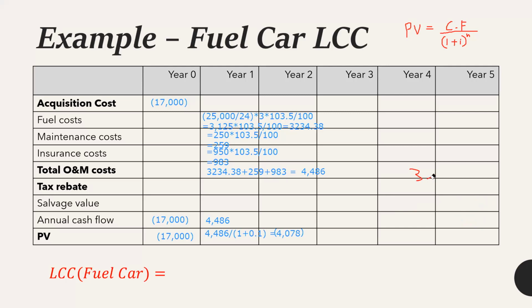So can you do the rest of the years and identify the net percent value for each and every year? After identifying the percent value for each year, to identify the LCC value, or the life cycle cost, you should simply take the sum of these percent values.